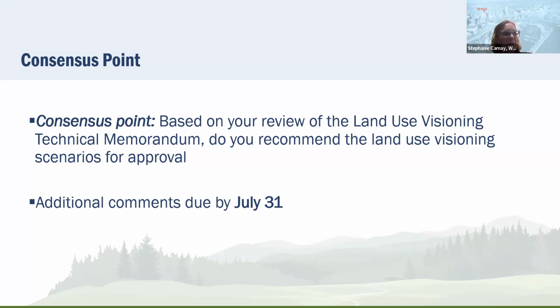But as far as moving forward, carrying the no build, it does really receive equal weight. It does have to go through the NEPA process. So, even at the end of the evaluation, if there are only a set number of alternatives that would move forward into the NEPA process, that no build would still be carried through. Okay. Thank you, Stephanie. Rhonda, I assume you got what you needed out of that?